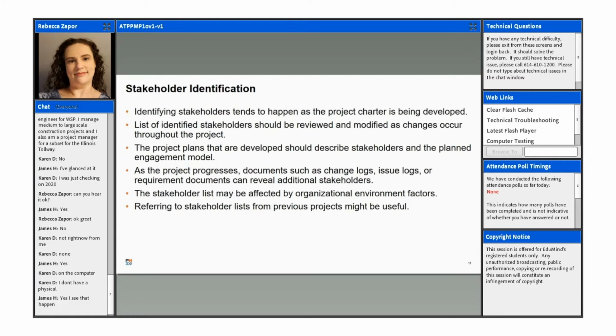Once we had resolved it, we did a root cause analysis and determined that there was one thing that wasn't adequately tested before it went into production. To get that tested, we actually had to engage another team who had specific resources, and identify those new stakeholders at that point. If we hadn't had that issue come up, we wouldn't have known that they needed to be on the project necessarily.